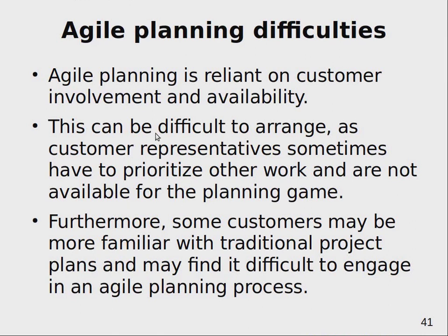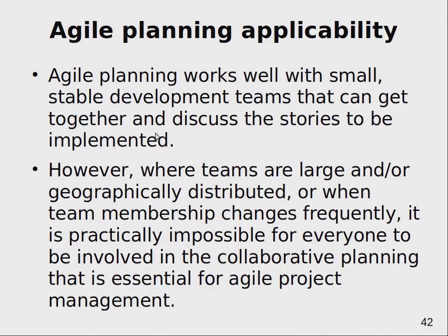And what are the difficulties? So for agile, the difficulty is that you can't make long-term promises, but usually you still need to make different kinds of long-term promises, and because of that, sometimes you can do different kinds of iterations internally, but externally you still need to work on planning in advance, then fulfill this plan approach.